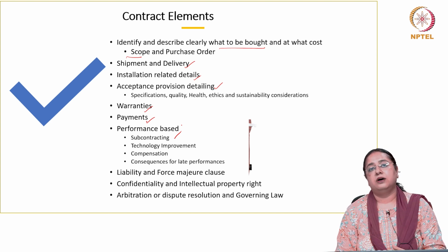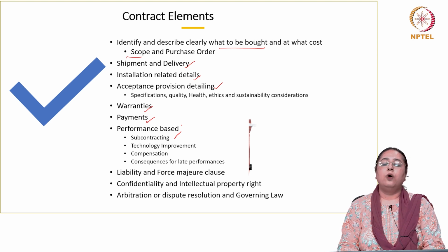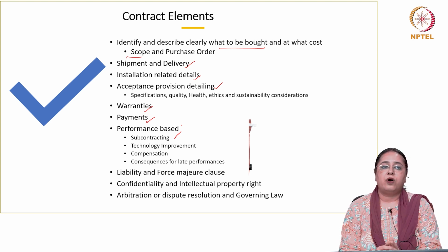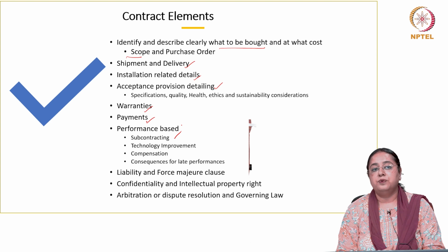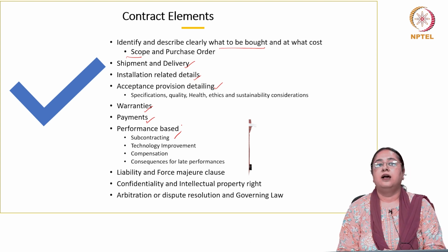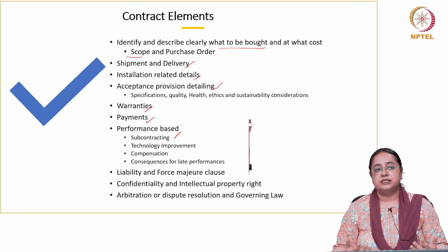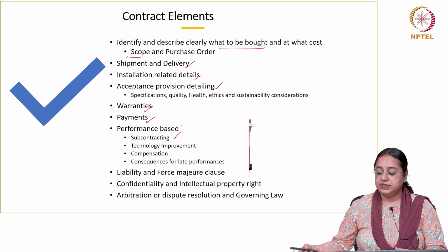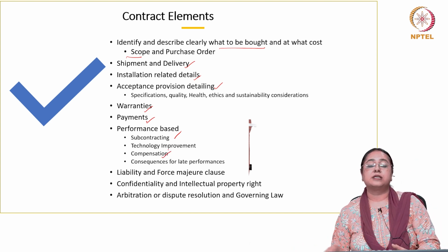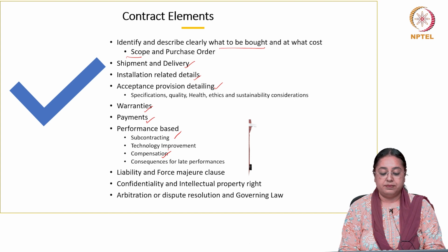Is this contract related to a project like an R&D project, research and design project, where one has to give a full scope for a supplier to take risk, especially for drugs, new drug discovery or new technology? In that case, one has to give good support to the supplier for taking risk. So the supplier would be compensated well, right? The compensation to the supplier for taking risk, but at the same time in a very watchful manner, right? All those clauses can be mentioned here.